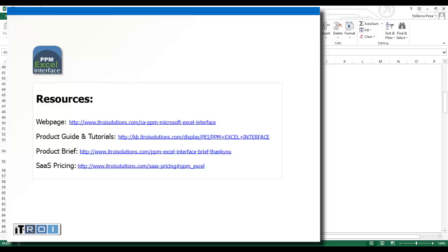All right. Is it possible to add a new resource here? Going back to the last screen that you were on. It is, but it isn't the interface that we would recommend that you add resources on. This particular interface is used for allocations. So if you wanted to add or remove resources, you would want to go to the project teams interface. That one's used for adding and removing team members from the project.